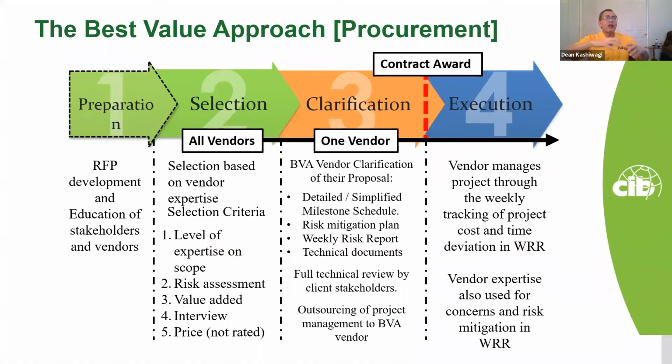And so we've developed this approach here that is very simple. On the procurement side, we identify the level of expertise, and based on that level of expertise, what is the risk to that vendor, how are they going to mitigate the risk, and what value can they add? We quickly interview them, and we use their price.